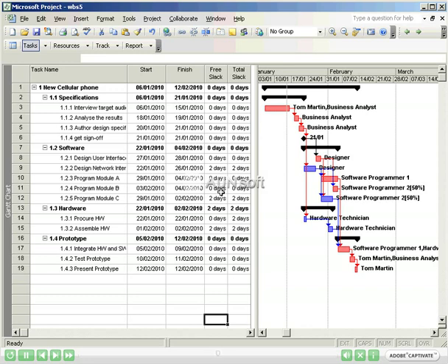First, are most tasks for the project on the critical path? If they are, there is a high probability that not all the tasks will be completed on time, and therefore a high probability that the critical path will change. High sensitivity. Is there more than one path to the critical path on the project? In our case there is not, but if there were, there would be a higher probability that one or more tasks on one or more of these paths would not complete on time, and therefore affect the critical path. High sensitivity.